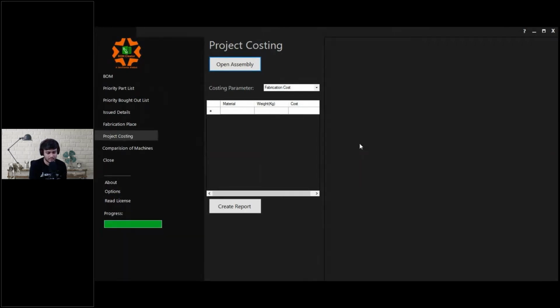So it could be a 150-hour job, it could be a 200-hour job, it could be a 50-hour job, it could be anything, right? So based on the size of the assembly, based on the components of the assembly. Next comes in, and in engineering we can also include the FEA charges. When I say calculation, if I need to do some kind of structural calculation, or some kind of CFD calculation, that also comes inside my engineering cost.